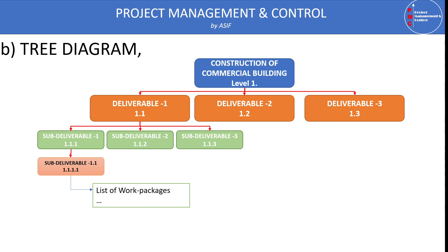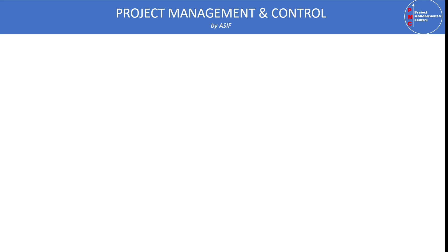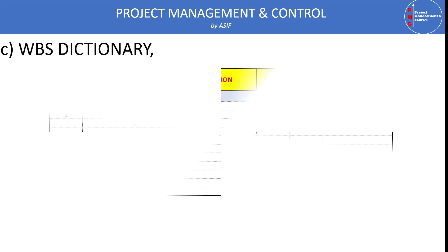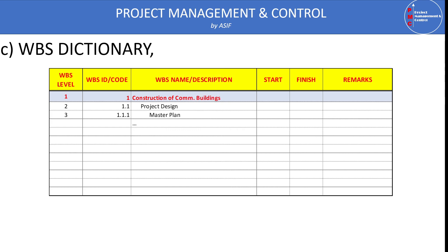The third method to document the work breakdown structure is the WBS dictionary. The WBS dictionary is like other dictionaries; we have WBS item, WBS level, WBS code, WBS description and name, start, finish, and any remarks. For example, level one is the construction of the building, level two is project design, level three items like 2.1.1 master planning. We share this list with all stakeholders and experts so we can gather feedback and refine it fully before implementing it in the project.